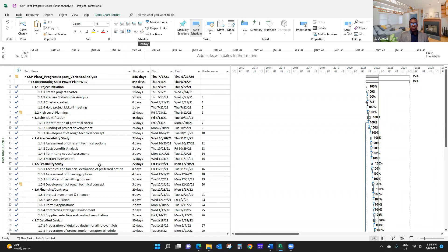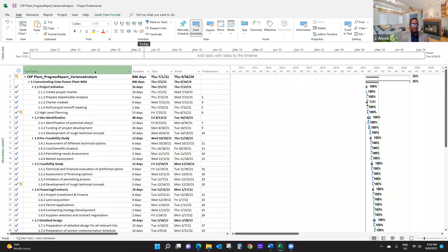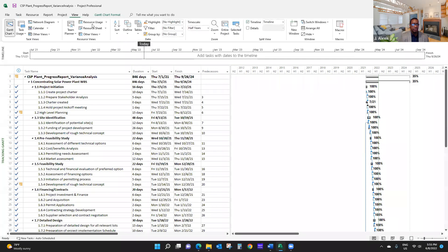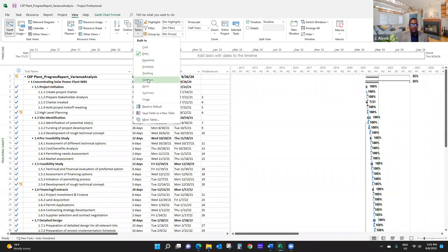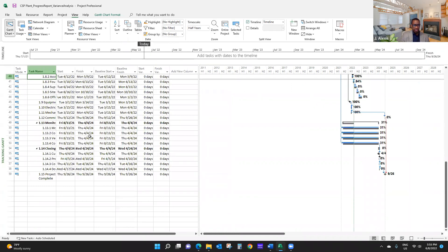Now that you've reported progress in your project, you can also tell the software how you completed those tasks — whether you completed them ahead of time, late, or just on time. If you want to take a look at a table showing that information, you can look at the variance table. Click on View and click on Variance. That shows you the variance table. You have the start variance and finish variance here, but as you can see, no variances have been reported yet. You have the planned start dates and planned finish dates — the baseline start and baseline finish — for these project activities.